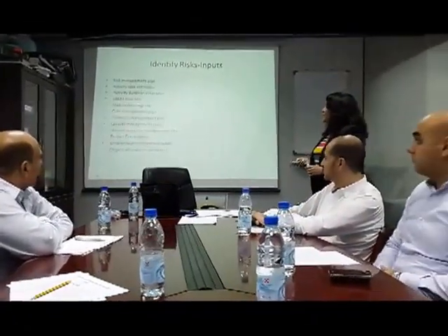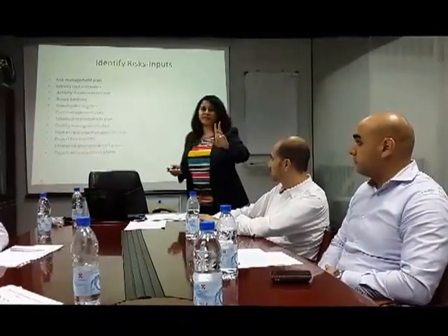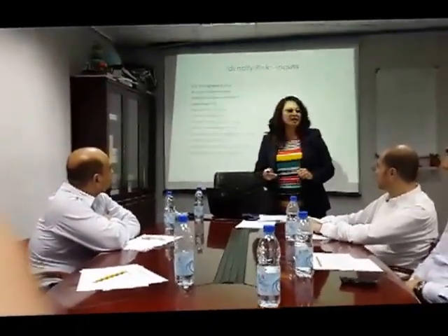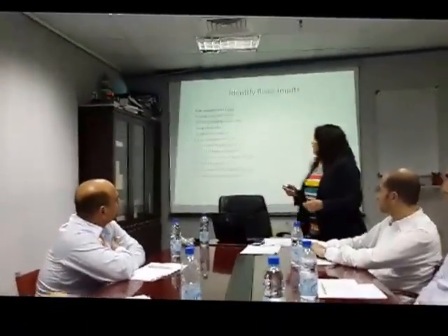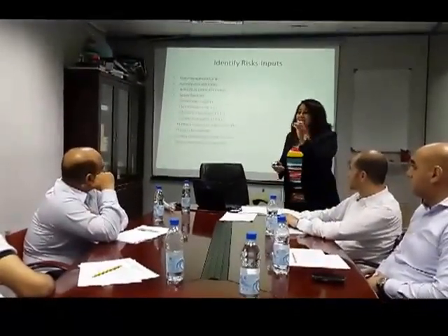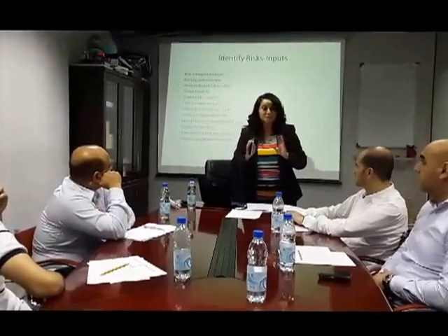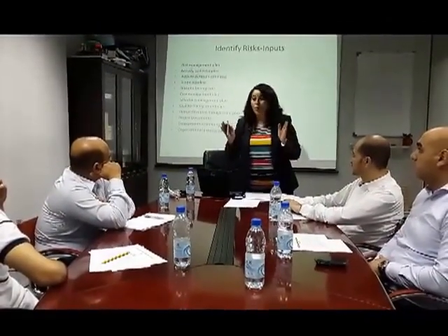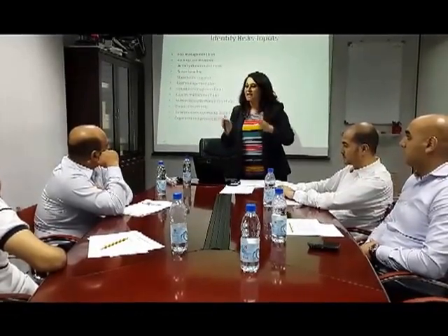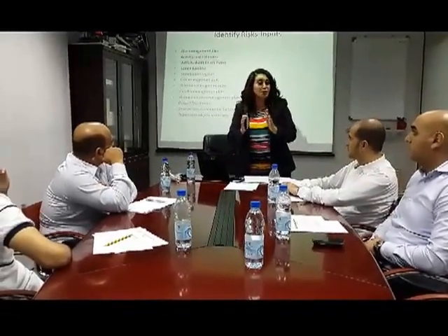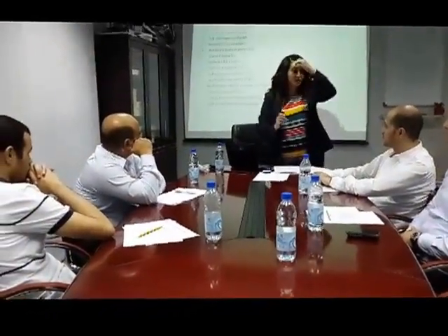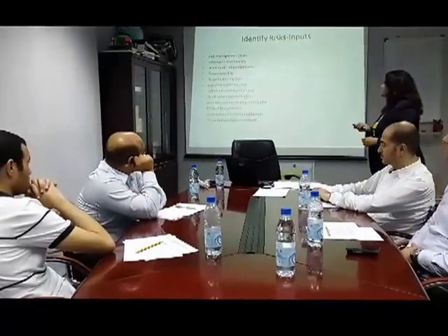Now, the scope baseline, you know that the scope baseline is made of three things: scope statement, work breakdown structure, and work breakdown structure dictionary. Now, I'm interested in the scope statement because the scope statement has the assumptions. Whenever you have a project, you start with assumptions. What are assumptions? Assumptions are like hypotheses that you take as true. You start with assumptions that you believe are true and are correct. Okay? So, I need these. I need to know these.